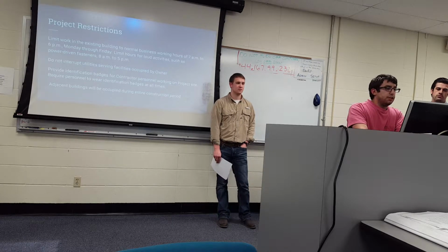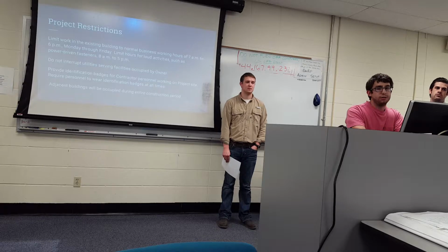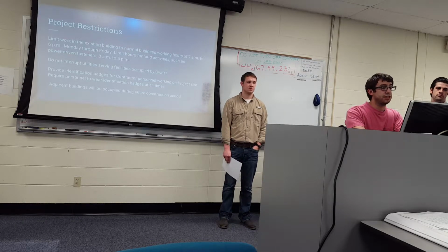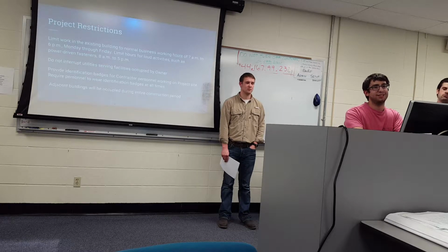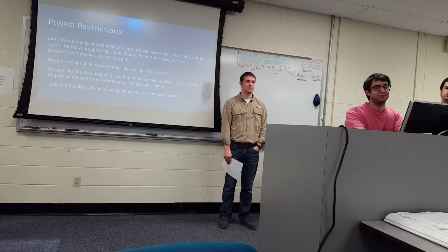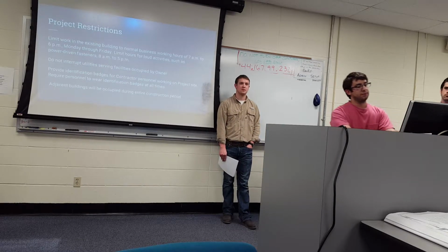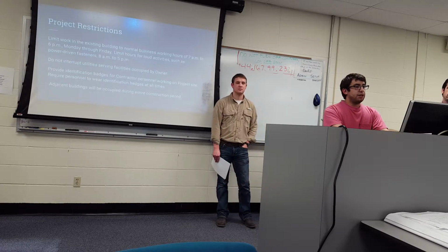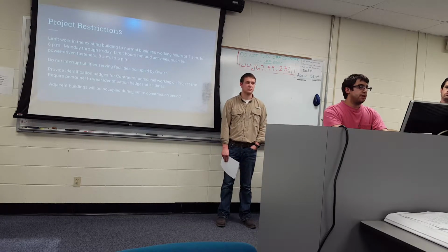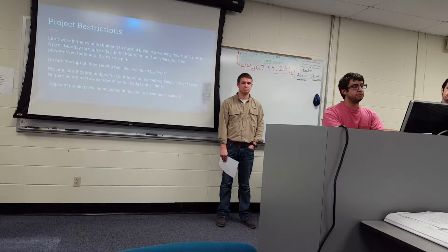Some of the restrictions we came across were limiting our work in the existing building to 7 a.m. to 6 p.m. Monday through Friday, and hours for allowed activities such as power driven fasteners. The hours that were listed were 8 a.m. to 5 p.m. It was also asked that we do not interrupt utility services for the facilities occupied by the owner, and that we provide ID badges for all contractor personnel working on the project site, and those badges must be worn at all times.